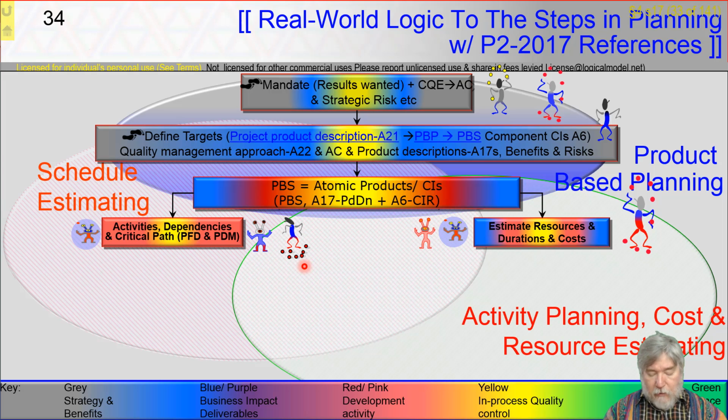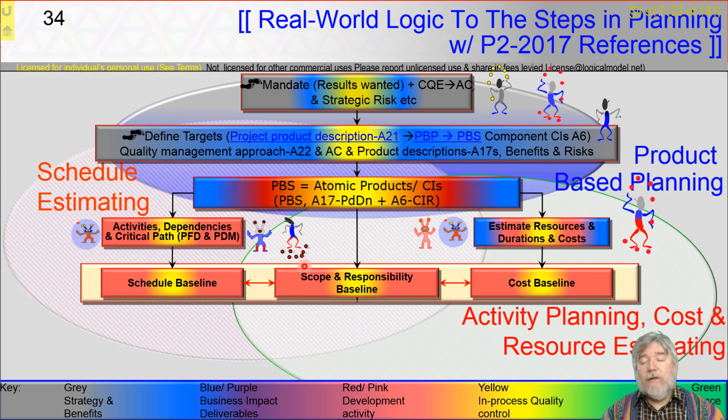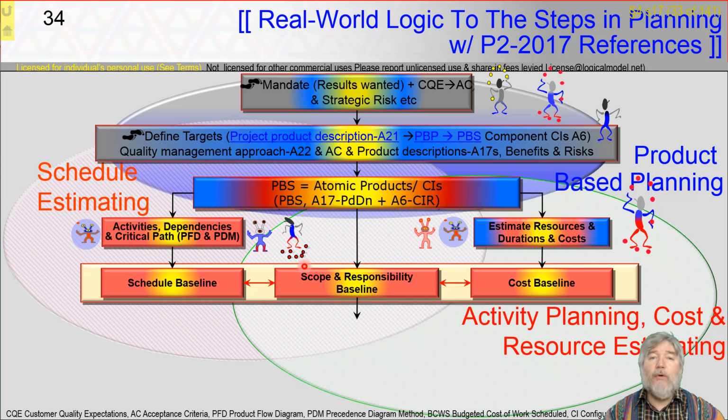And that brings us to a position where we can say if you combine these things together you get the project baseline. Now the project baseline in an agile environment is a vision of where we want to go, a backlog of things that we'll do as and when we get the time, and the stuff we're going to do in the next 2 weeks or 4 weeks.